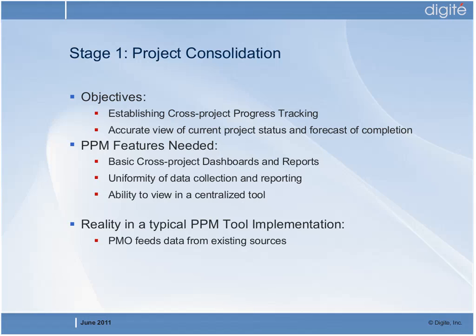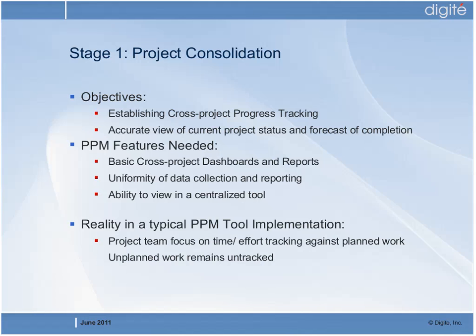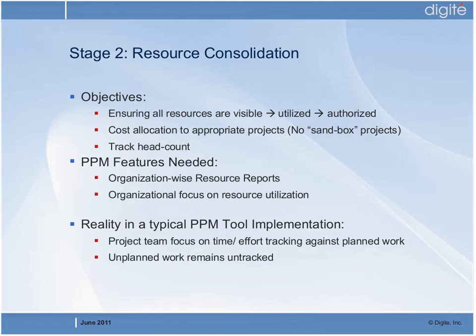So that's typically a first level portfolio management effort that we've seen a lot of our organizations and customers handle. In the next stage, which is resource consolidation, the objectives typically are to ensure that all resources are visible. First of all, there is a centralized resource pool that is defined, and everyone knows immediately where the resources are, where they are assigned, what their level of utilization is, and whether they are authorized to work on projects or not. So there is a sincere effort to move from what are called sandbox projects, which are